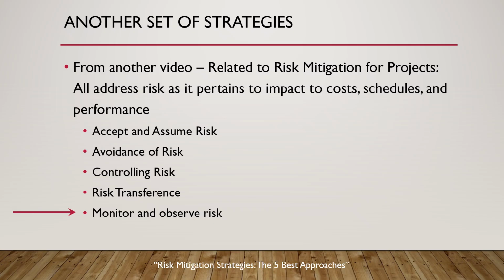We can, as mentioned, just accept the risk, but that is only done when the impact is considered to be so low that the cost of mitigating it in some way is higher than the impact should it occur. We also accept risks if the chance of the risk is considered so low that it is deemed highly unlikely to occur, but then we also have to consider the impact should it actually occur. If the impact is to a mission essential function, then we might not want to take this strategy.